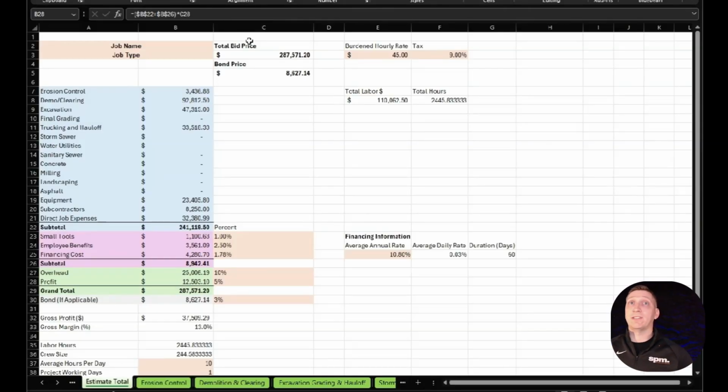If you do a $300,000 job and you win, you do 3%, and you might make $8,000. Like, I don't know if that's worth it, but that's up to you. That's how we want to look at all of this. And we want to match our overhead to the cash flow forecast when you calculate your overhead amount. And we're watching this every month. We want to see what our SG&A is. That's going to be your overhead. Whatever that percentage is over a 12-month rolling span, we want to put in here.